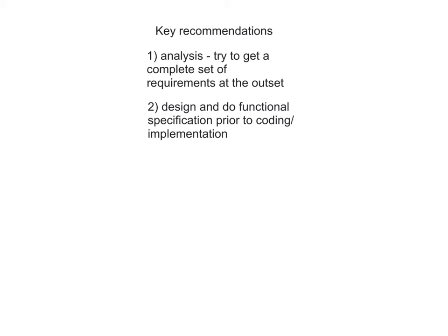So as I described earlier in this presentation, a good idea is to design by use case, in which case you've got your analysis for your use case diagram, which can drive into your design, which again you can tie to the use case, and then you can implement across the use case as well. So in a typical software project, it's actually sticking to this use case space, as it were. It gives you this traceability all the way through, as in you specify a use case, you design it, you implement it, and then you test over it as well.